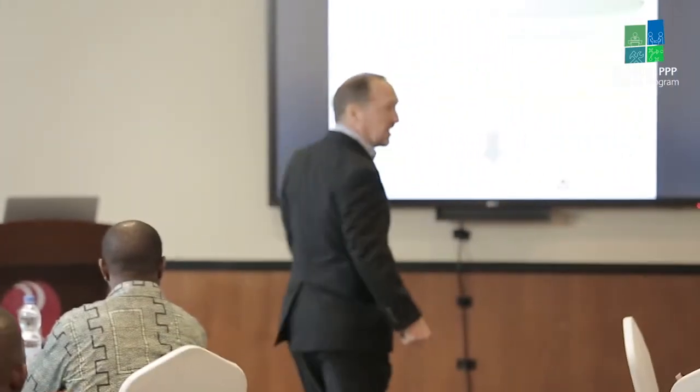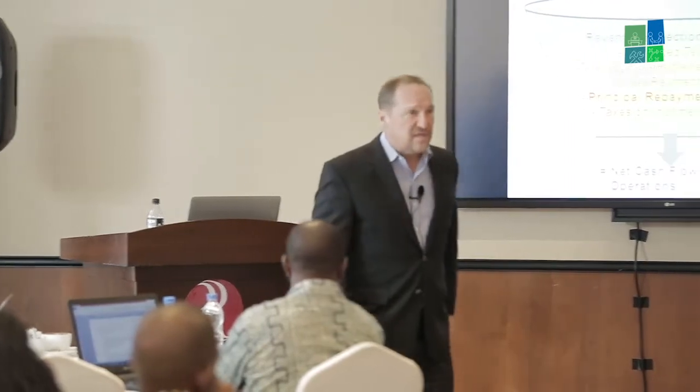We're only counting things that we either collect in cash or that we spend in cash. So even the top line here, revenue collections, is in cash. For example, and this can be a significant risk in PPP projects, you're a PPP provider distributing water, perhaps to schools, hospitals, correctional facilities, or whatever, and you're having a tough time collecting from them. Maybe they don't pay their water bills, and maybe it's going to be very difficult for you to actually enforce collection from them.